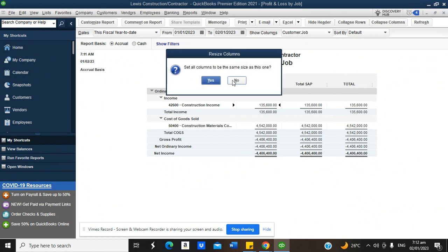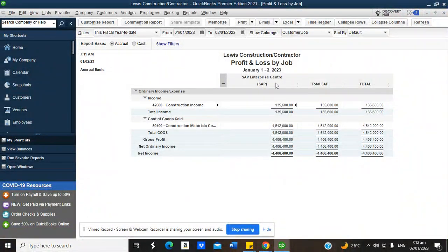So why are we saying this? It is because at the point of posting the transaction, the system gives us that room to map all the income and also all the expenses to this particular project. You can see so far we only have 135 that we've received, and then this is what we've spent. What does that tell you? It means that the client wants us to use our money to run the project while they make progress payments, or while they expect us to send progress invoicing based on the work that has been done so far.